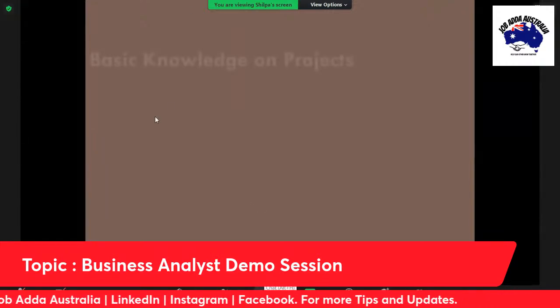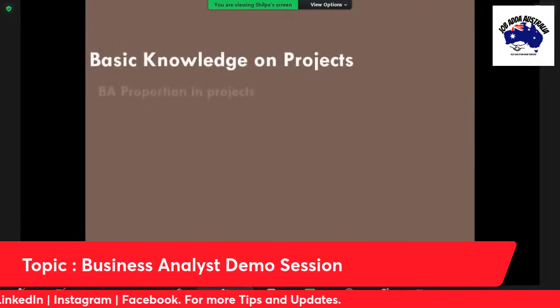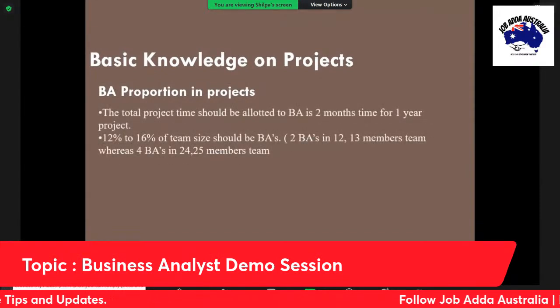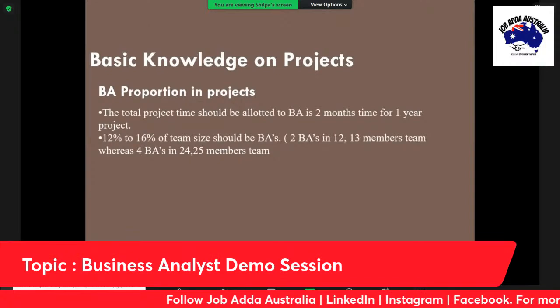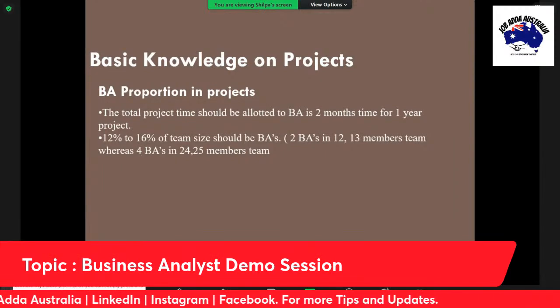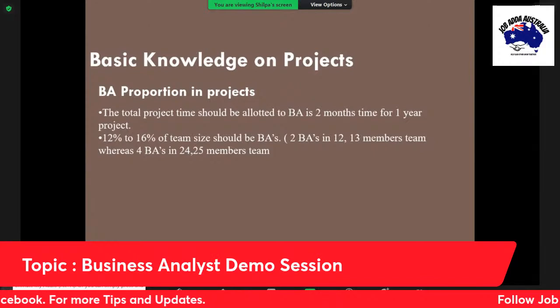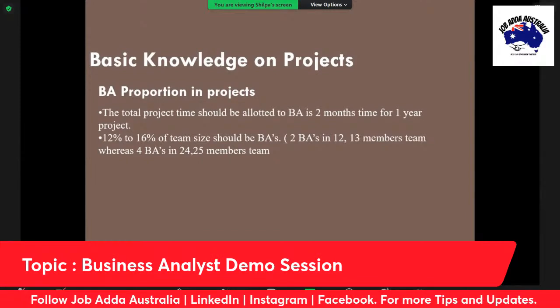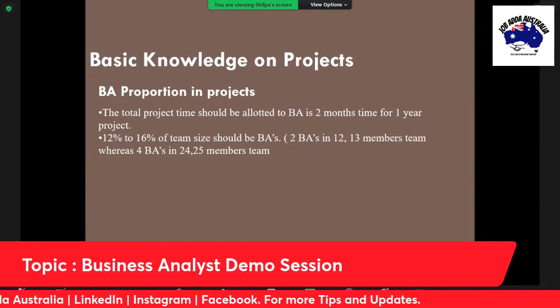Now we are going to talk about the general information that you should be having. Okay. So the BA portion in a project. If your project is a 1-year project, then your role as a BA is going to be of 2 months. That is planning and analysis. Rest of the 10 months, you are going to track the requirement with the help of RTM. You are going to handle change requests and you are going to drive client for UAT, user acceptance testing.